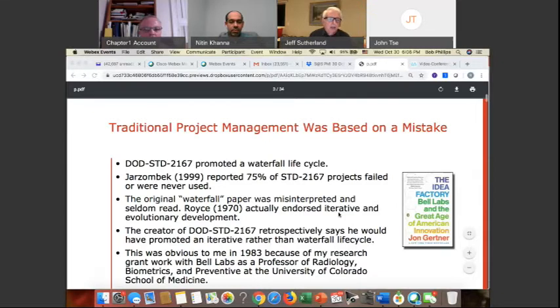Fast forward a few years, and Jasenbeck reported that 75% of these projects using this standard within the DoD had failed, or the results were never used. When Craig interviewed the writer of this specification, he said it really was a mistake, and he was not an expert in methodologies. He read a few books, he talked to a couple of consultants, and he wrote the standard. He said today he would not do that. He would be promoting iterative and incremental development, which is what Royce, in his 1970 paper, the first waterfall paper, actually was promoting. He was not promoting the waterfall methodology, but he endorsed an evolutionary development as well.